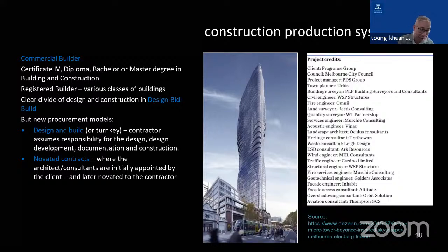These days, the construction production system is beginning to overlap. So we now have procurement methods where it's design and build. So the contractor now assumes responsibility for design, design development, documentation, and construction. That's very common to you in Indonesia as well, I believe. So you can also have design and build, where the main contractor takes over the responsibility for the design, and the architect works for the main contractor.